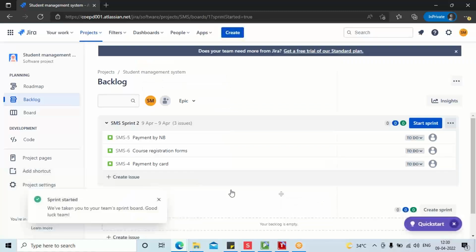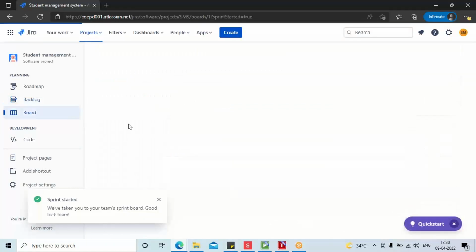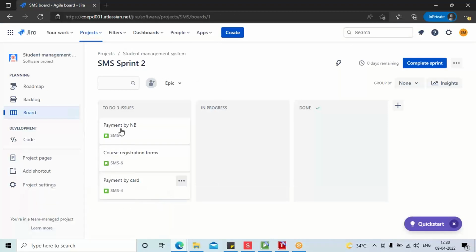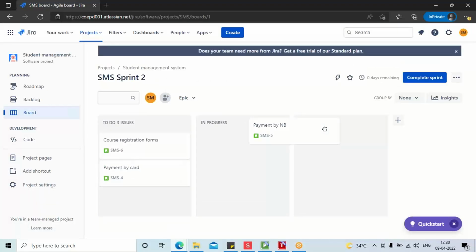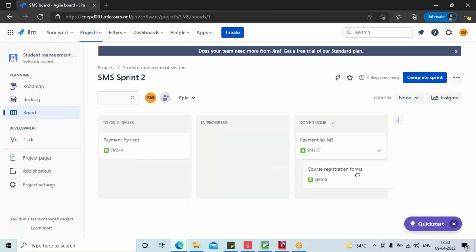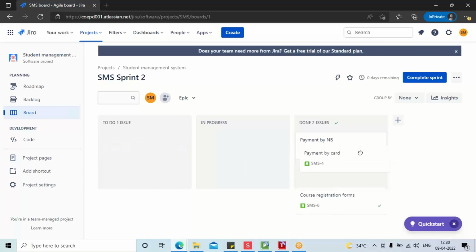Madam, can we make changes during the stage, and even in the done stage? What kind of changes are you looking for? Like the client asking for changes from his side. Then the changes will be added to the product backlog, and then you'll create a new sprint. You can't generally add any user stories to the sprints.